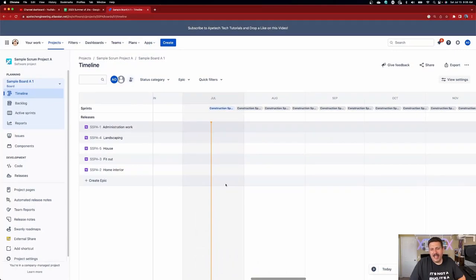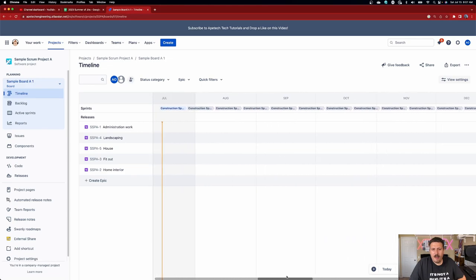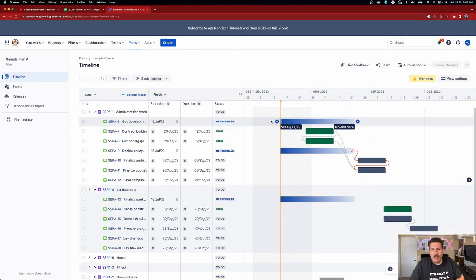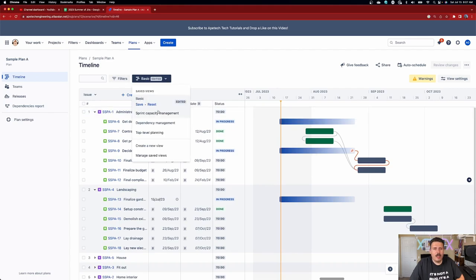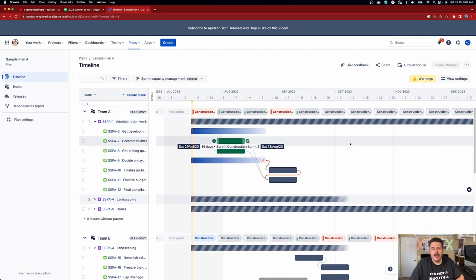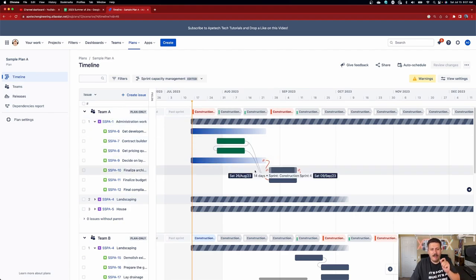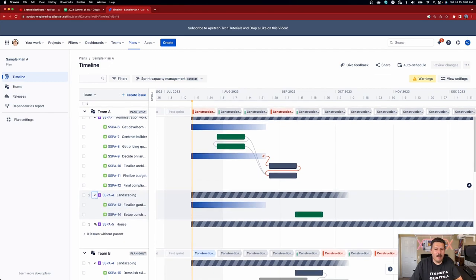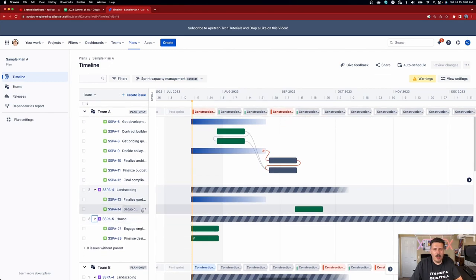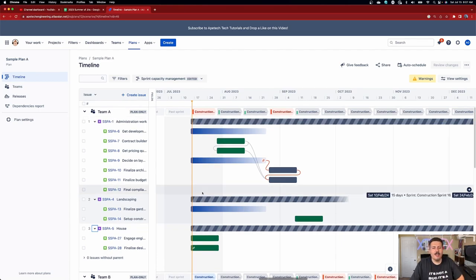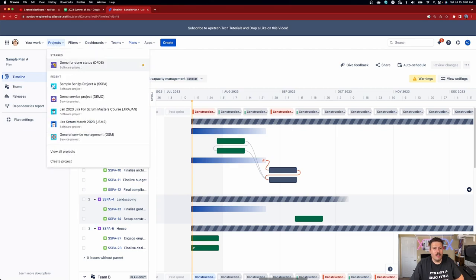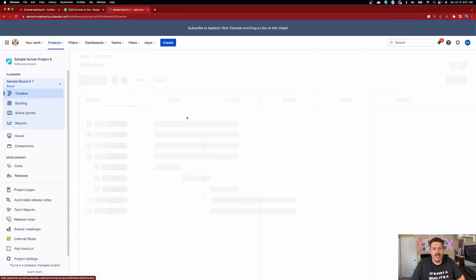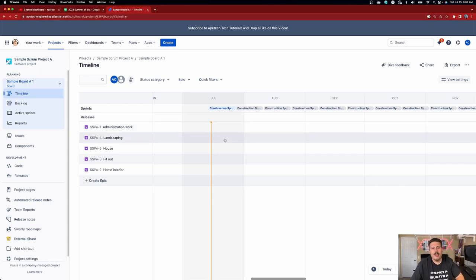Now the dates here, this is interesting. So the dates that they put into the epics, because they're all rolled up dates and, and I, you can tell that they're all rolled up dates because when I go and look at my sample plan, the epics up here don't have the dates, right? So if I switch back to a sprint capacity view that they had, you'll notice that these are all grayed out like this because they're rolled up. That means that they are inheriting the value from the children. And so as I expand these epics and these stories, you'll notice that these dates are the ones that are going to dictate the epics. So because they do that, the basic timeline over here in the project is not going to show me any dates because it's inherited. And that inheritance and that roll up is only an advanced roadmap feature.